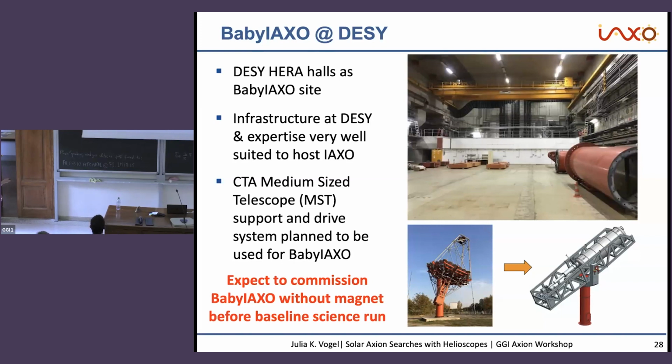There was a prototype set up in Berlin that we transported to DESY and will be able to refurbish to use for the BabyIAXO experiment. Due to the anticipated magnet delays, we expect to set up BabyIAXO with all the components prior to having the magnet, so we can do all the commissioning, alignment, and everything. And then once we have the magnet, we put that in and do our baseline science run.